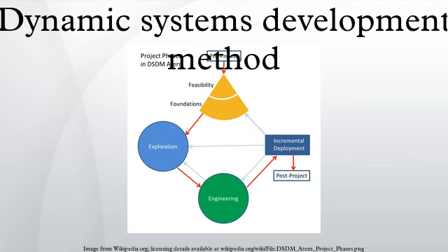Phase 1, the pre-project phase. In the pre-project phase, candidate projects are identified, project funding is realized and project commitment is ensured. Handling these issues at an early stage avoids problems at later stages of the project. Phase 2, the project lifecycle phase. The process overview in the figure below shows the project lifecycle of this phase of DSDM. It depicts the 5 stages a project will have to go through to create an implemented system.